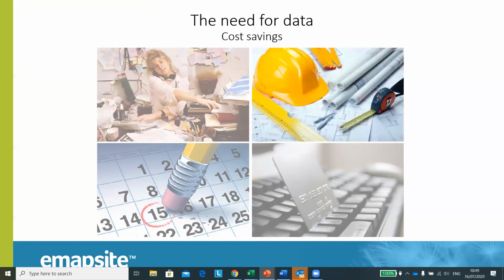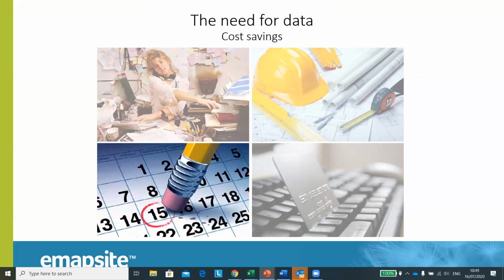And this is especially evident in the planning and preparation stages of a development, whether it be a large infrastructure project or even down to an extension on a house. Having the information procured for you will have significant time and cost benefits at this stage. And having the utility information at hand before breaking ground can also save you from potential rescheduling nightmares by ensuring you don't go into projects blind to the utilities you might find in the site area.